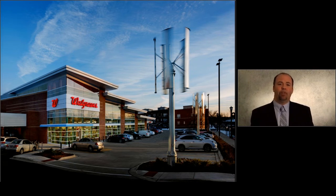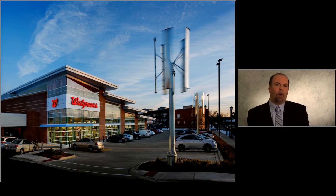One of the lessons that we learned, I mentioned earlier in the presentation that we had to find a timeline that fit. Our executives didn't want us to do this store in Evanston because it's not a very high-profile corner. But because of all the other things I had mentioned, this made the most sense. So the caveat they put on the approval was that we had to meet the existing timeline. So we had our Eco Charrette on September 24th of 2012, and this store opened on November 21st of 2013.